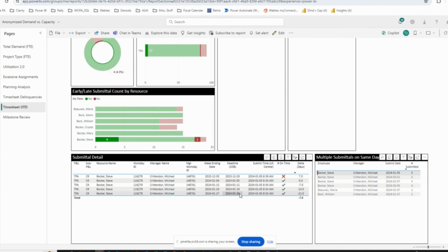Well, these things are submitted, and in our case, they're interfaced into our ERP system, Oracle Project Accounting. So the cost is hitting the project in our financial system of record. But what if he winds up instead, something happens and he gets pulled off those projects and put on some totally different ones because of some emergency demand, and he's already submitted his timesheets. Project A that he didn't work on already got a lot of hours booked to it. Project B that he is working on isn't getting any hours booked to it, because what are the odds somebody's really going to go return all those timesheets so we can correct them and resubmit?